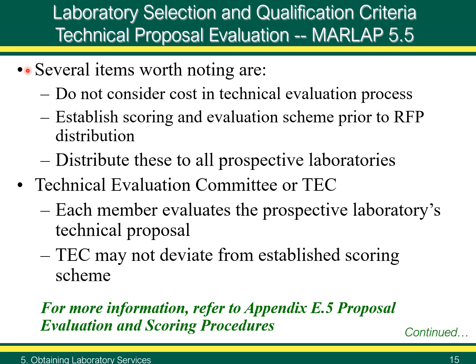Several items worth noting are: do not consider cost in the technical evaluation process. Scoring and evaluation schemes must be established prior to RFP distribution, and the evaluation scheme should be distributed to all prospective laboratories.